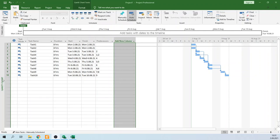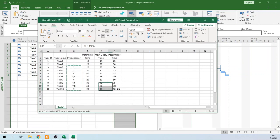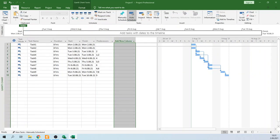Hello guys, in this video I'm going to show you how you can make a PERT analysis in MS Project software. In order to do that, I prepared an example project and entered some data into MS Project. It has names and predecessors — I haven't entered any duration yet, but it automatically creates duration. You have to make sure the task mode is set to auto schedule.